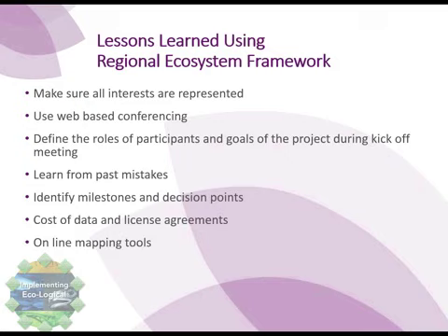Lessons we learned, and I only learned things the hard way, are to make sure that all interests are represented, because even the perception of bias is a significant issue. We used web-based conferencing to make meeting attendance easier because everybody's busy and we did not want to give anyone an excuse not to participate. We needed to define the roles of participants and the goals of the project during the kickoff meeting so that everyone knew what to expect.